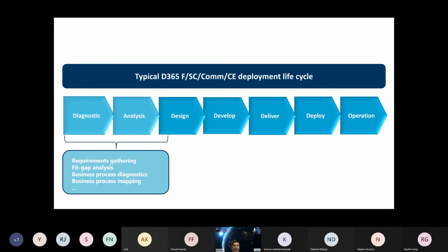If we take a step back and look at this slide, requirements gathering is usually mostly done during the analysis phase for most ERP or CRM projects. Sometimes it starts even before that during diagnostics, when the pre-sales or sales activities are happening. On the other hand, it may drip down to the design, or at least the early days of the design, especially when you are doing proof of concept or conference room pilots to solidify your requirements.